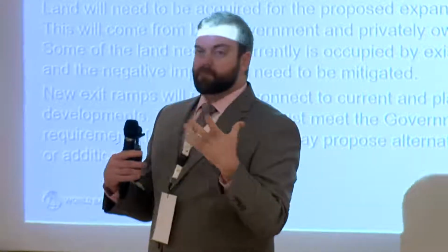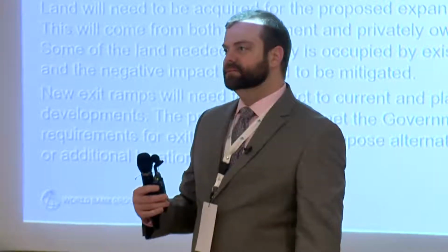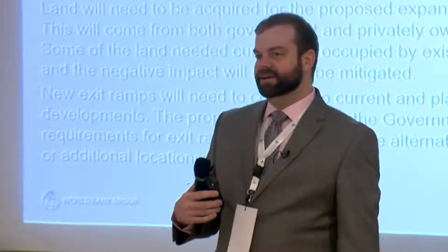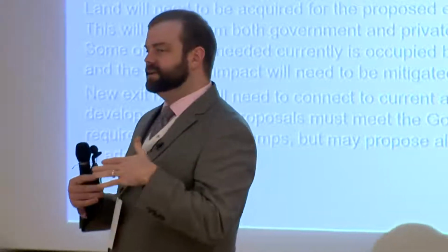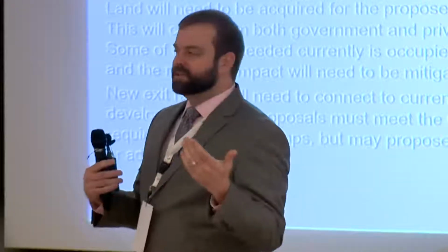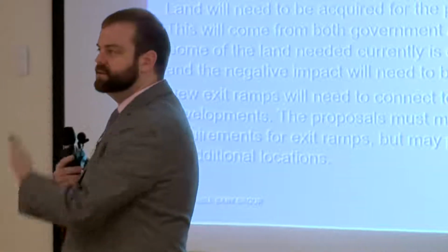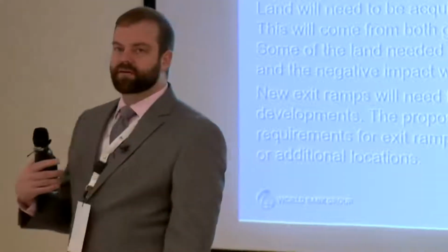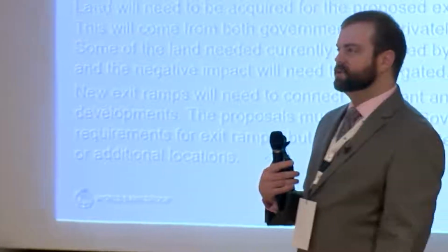What may have been missing is, why do you want this project to be a PPP? Explain that, because you're putting down the criteria of what you need out of it, but if you know exactly what you need and you don't need anything from the private sector, then what's the purpose of it being a PPP, right? You can just do it with traditional government financing, right? Or you do a design-build contract.